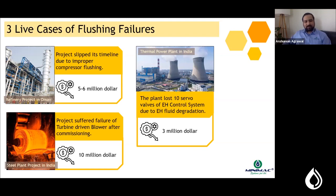The third case involves the electro-hydraulic (EH) control system of a coal-based thermal power plant in India, where the servo valves failed in a very short duration, impacting around 3 million dollars to the operating power plant. These incidents help us understand the myths prevalent in the industry around lube oil flushing.